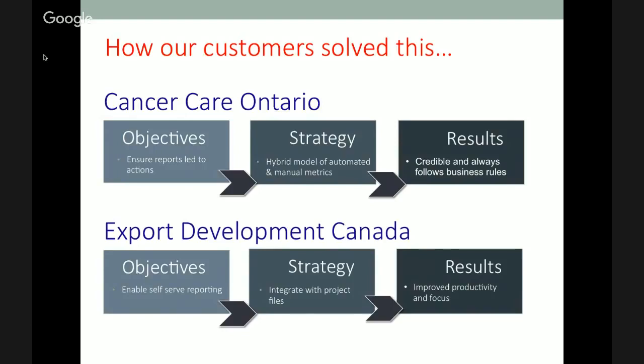So what we need to do is always get agreement from your project stakeholders and your sponsors. If this goes to red, what does that mean for us and what's going to happen? Have those decisions laid out. This is in red. This is what we need to do because it's in red. They wanted to make sure that people weren't just looking and absorbing the data, but actually taking action. The way that they did this was very interesting, and it's very new in looking at reporting.